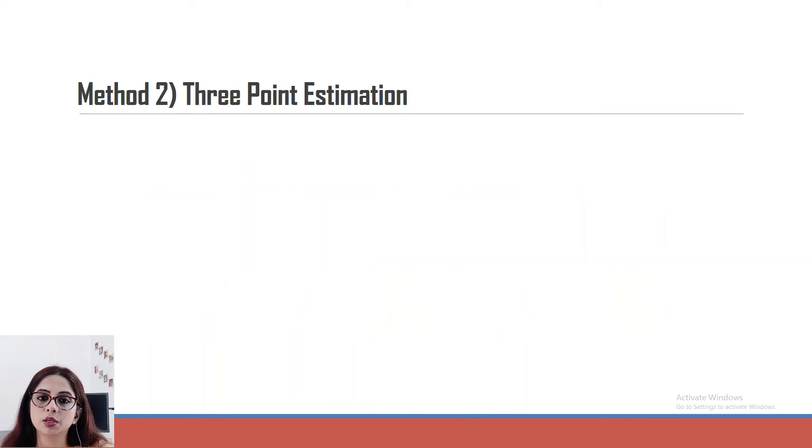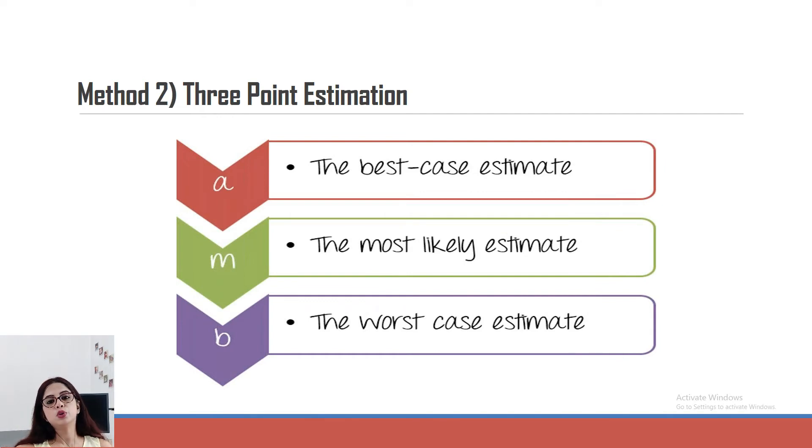Similarly, we have something called three-point estimation. You can make estimation based on the best case estimations. Whenever you're filling in any estimation sheet, there are three different columns - best case, most likely estimation, and worst case. In the best case, you have to tell them what is the minimum time you think that you need to complete this particular task. Let's say you think in two hours I can do it.